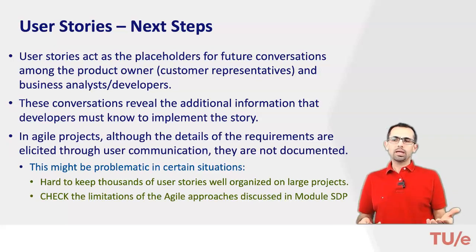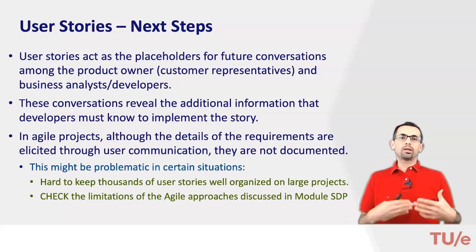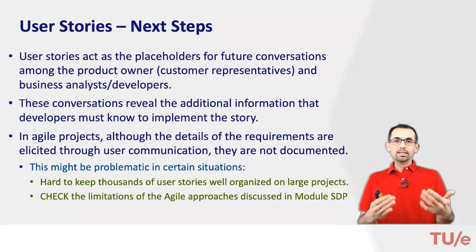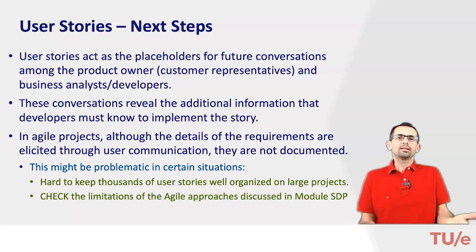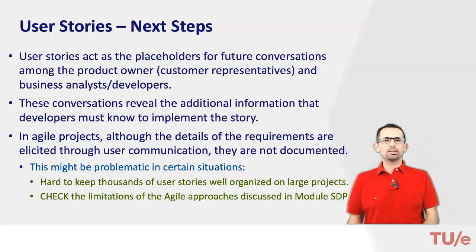So what you do basically, mainly in agile projects, you take a particular user story and then you work with the users. You sit down with the users, in fact, and define what exactly this means. So define the details, but you don't have to document them. You don't document them the way you do use cases.